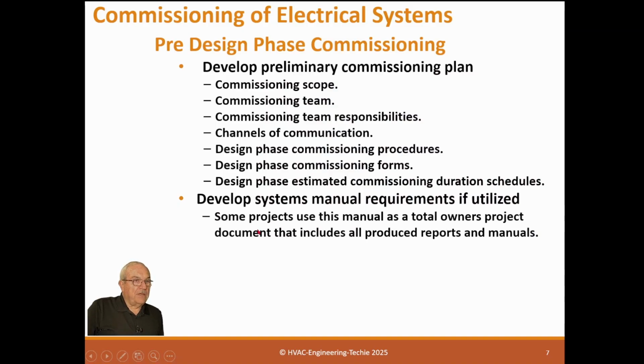Now, a system manual, it includes everything an operator needs to know to operate this facility. It's fairly complete, and it includes the O&M manual, but it's better than an O&M manual because O&M manuals are not real user-friendly.